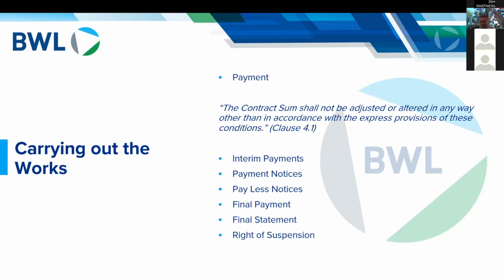So the bill of quantities sets out all of the items that constitute the construction. Then you have a price against each item of the bill of quantities, and then when you make your application for payment as a contractor, you're applying for percentages of each item that you've completed in that month.